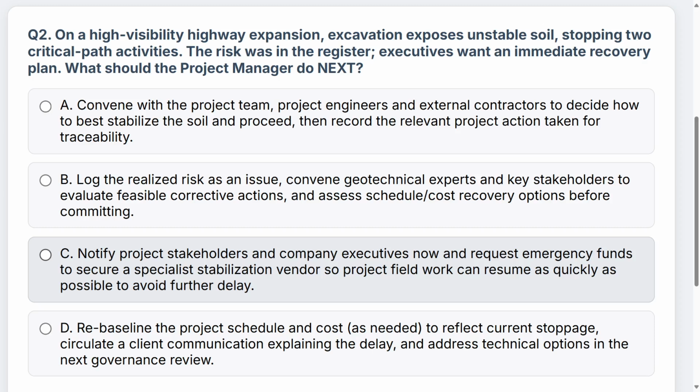Remember DIXIV: define the problem and identify the root cause. Then you generate alternatives. You don't prescribe alternatives before you work on identifying and generating them sensibly with the team. So while C is not a bad thing to do, it is also premature at this point.